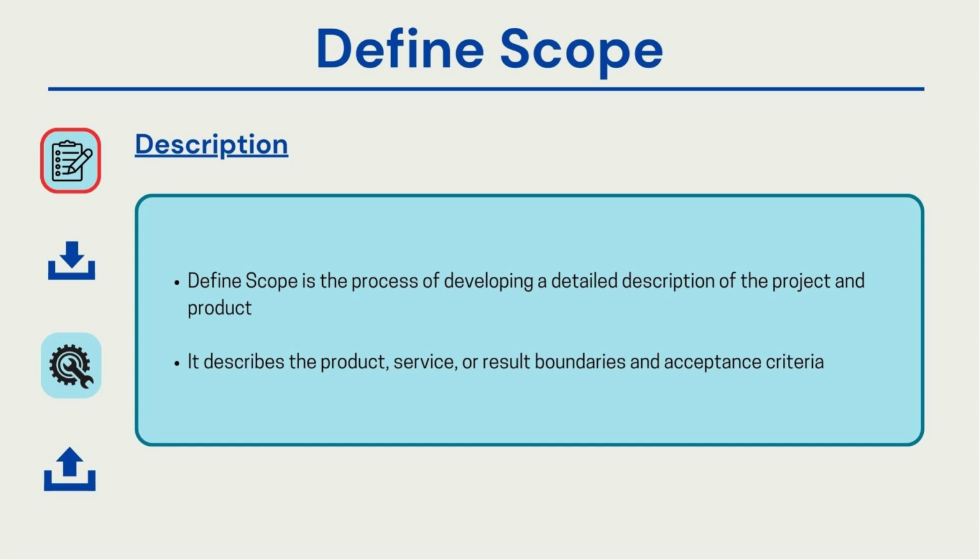For example, if you are producing some software that supports only one language, which is English, then this needs to be explicitly mentioned. If it supports two languages, that must also be explicitly stated, and it should be clear that it does not support any languages beyond those agreed upon.